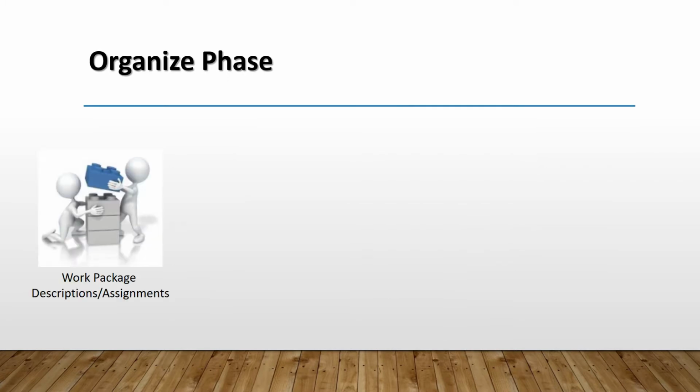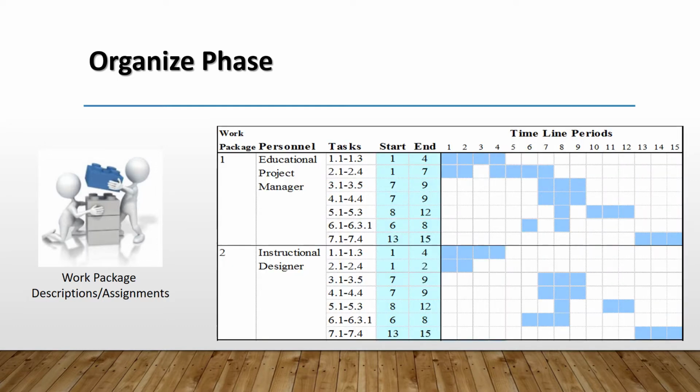Our project team has also compiled the tasks and activities from the work breakdown structure into groups that require a common skill set. These groups of tasks are called work packages. The work packages are assigned to the appropriate personnel who have the skills required to complete these tasks.